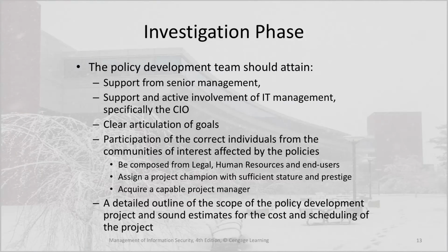A project champion should be assigned with sufficient stature and prestige, and a capable project manager should be acquired. A detailed outline of the scope of the policy development project and sound estimates for the cost and scheduling of the project should also be developed.